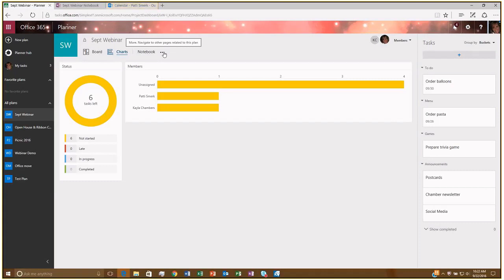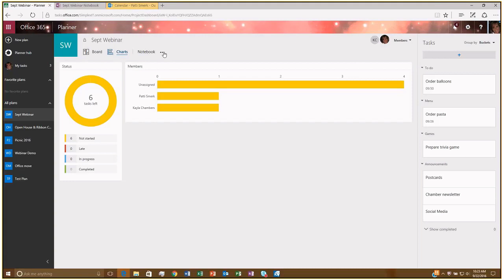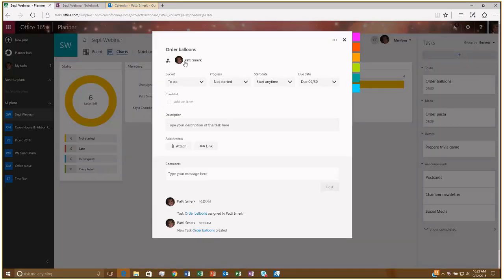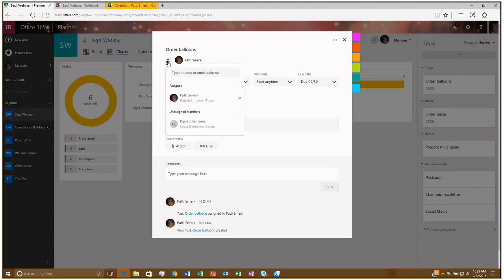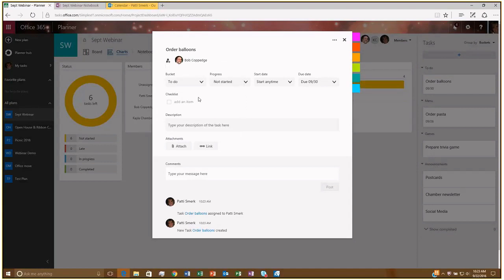So regarding dependencies, that's one thing that planner does not have. So what I've noticed is there's no way to really say, okay, I can't do this task until this task is done. I can't create the postcards until I create the social media graphics or something like that. There's no way to really have those dependencies. The other thing I kind of don't like, but it's not really a huge block, is that you can't have more than one resource on a task. So I got around that the couple times that I ran into an issue with that. I got around it just by creating two different tasks or two different cards for two different people. But you'll notice that there's only one option for your resource. So if I click on that to change it, I can change it to somebody else or I can change it to Bob. But then that automatically removes me and adds the new resource.